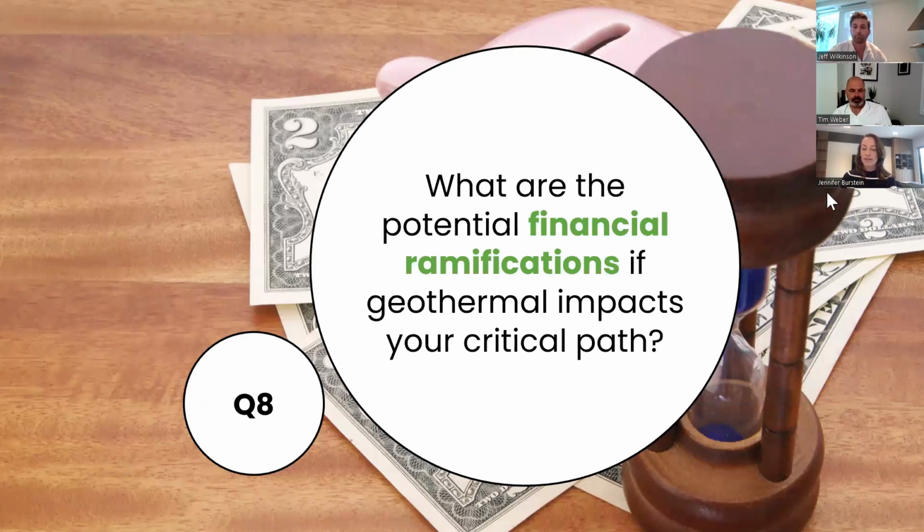So, I think this question can be answered with any schedule impact, not necessarily just geo, but a schedule impact predominantly towards the end of the project is going to have a critical impact on the overall profitability of the project. And it could delay the occupancy dates that you were expecting for interim occupancies on a condo, let's say, or final registration of the building and closing. So like Jeff said, it's really important to get everything coordinated, sorted out before you've got your first boots on the ground.